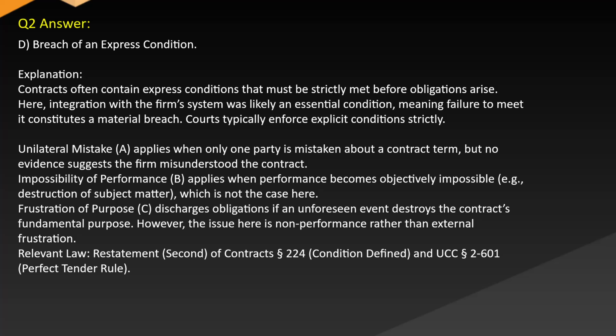Answer D. Breach of an express condition. Explanation. Contracts often contain express conditions that must be strictly met before obligations arise. Here, integration with the firm's system was likely an essential condition, meaning failure to meet it constitutes material breach. Courts typically enforce explicit conditions strictly.